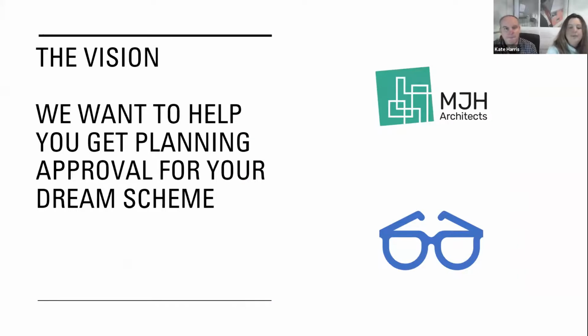As a rule, the same number of drawings are required for a permitted development PD application as you would need for a full planning application, but PD applications are more likely to be approved, and there is usually more risk with a planning application. But very often a full planning application is required to help you get your dream scheme, which we are always working to help you achieve.